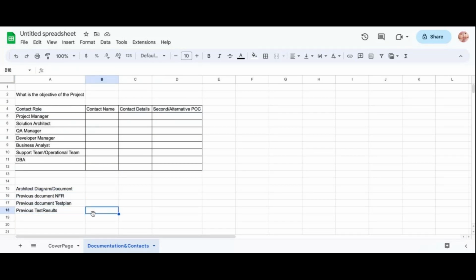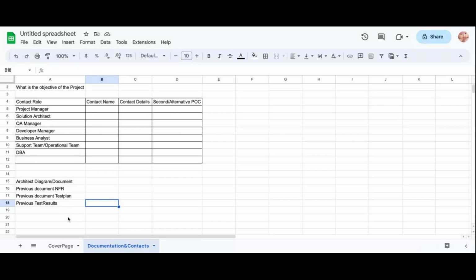Okay, and very important thing, in the NFR call you have to ask multiple questions, not only this document. What is that? Whether the functionality is stable, built-in, available for scripting or not, because as I mentioned, your application should be stable. If it's not stable and they are still doing development, it's pointless doing performance testing.